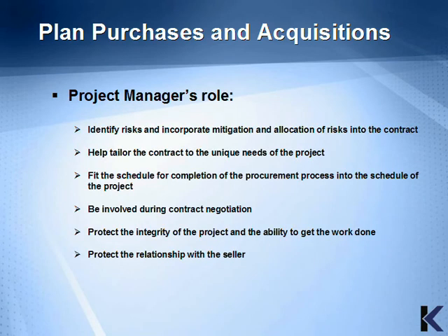The project manager must be involved in the creation of contracts and fulfills the following key roles: identify risks and incorporate mitigation and allocation of risks into the contract, help tailor the contract to the unique needs of the project, fit the schedule for completion of the procurement process into the schedule for the project, be involved during contract negotiation, protect the integrity of the project and the ability to get the work done, and protect the relationship with the seller. The project manager would be involved in one of the following types of contracts.